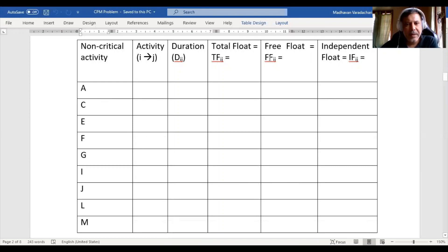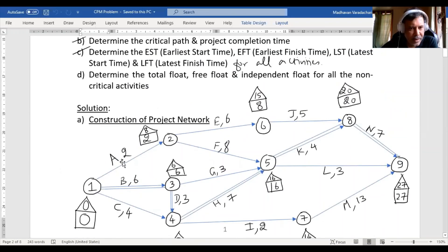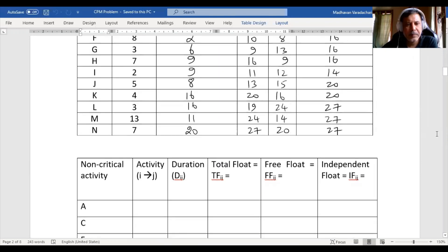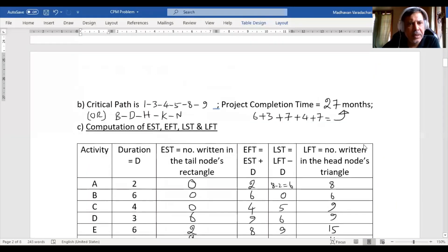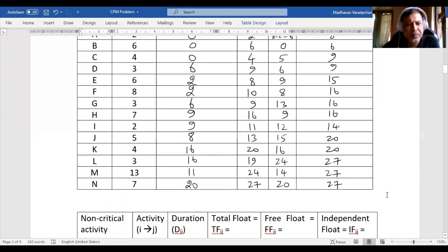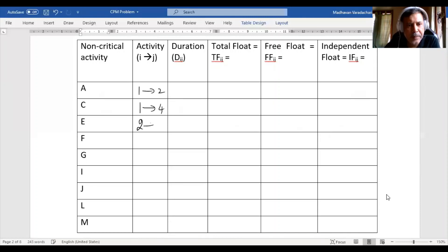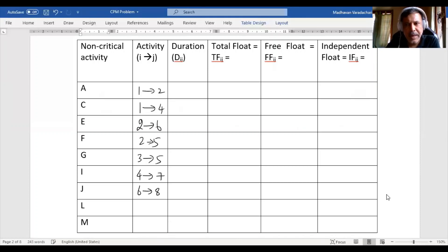Let us go back to the diagram and identify the node pairs for each non-critical activity. Activity A is 1 to 2, C is 1 to 4, E is 2 to 6, F is 2 to 5, G is 3 to 5, I is 4 to 7, J is 6 to 8, L is 5 to 9, and M is 7 to 9.